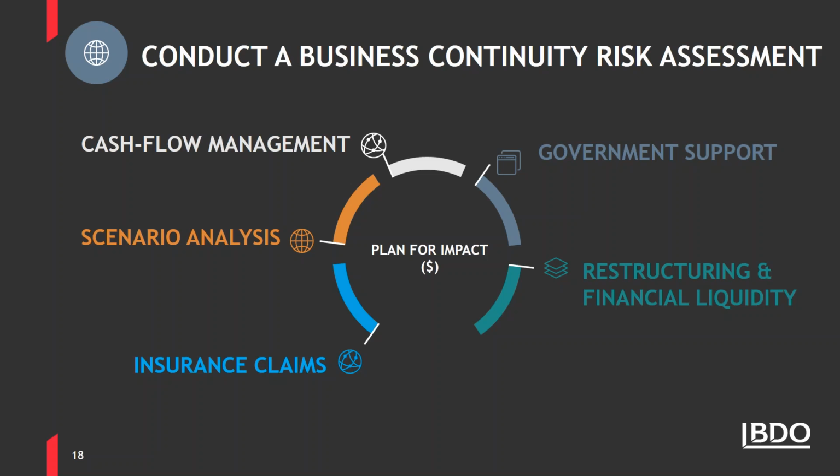You could be utilizing effective scenario planning by creating what-if analysis to project the impact of high probability risks, factoring key stakeholders in your financial sensitivity analysis, be it lenders, project owners, subcontractors, equity holders, and your other partners. Track activity and cost accounting to document the impact of COVID-19. Prepare applications to obtain government relief and support. Update your operational and financial models, and use cash flow forecasting to anticipate when and how COVID-19 measures will impact business.